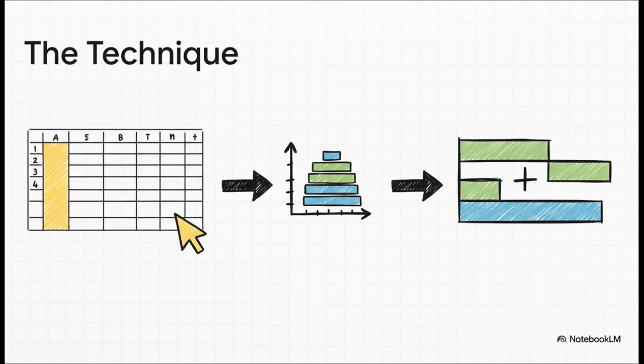So here's the little trick, the technique behind it all. We're actually creating a bar chart with 2 pieces. The first piece is just a blank space, an invisible block that represents the start date. That invisible block pushes our real task bar over to the correct starting point on the timeline. That's the whole hack right there.